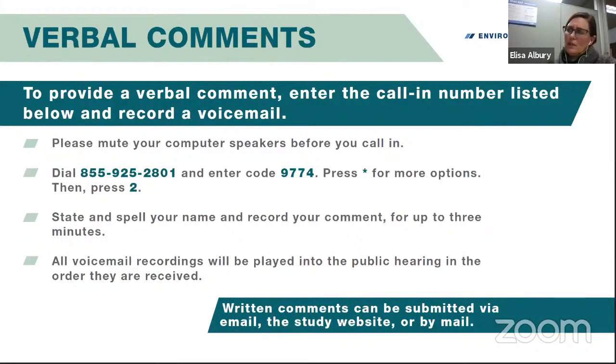Bo, I think you asked a question about when would we build this noise wall? So that would be part of the full build out associated with whenever we were doing the widening of the 1600 South corridor. And so if I'm not mistaken, and maybe Darren can weigh in if I speak incorrectly, that would be in phase 3 of construction of this project. And I don't recall exactly what year we anticipate that happening. That's correct, Alisa. It would be in phase 3, and the year that would happen is not determined at this point.